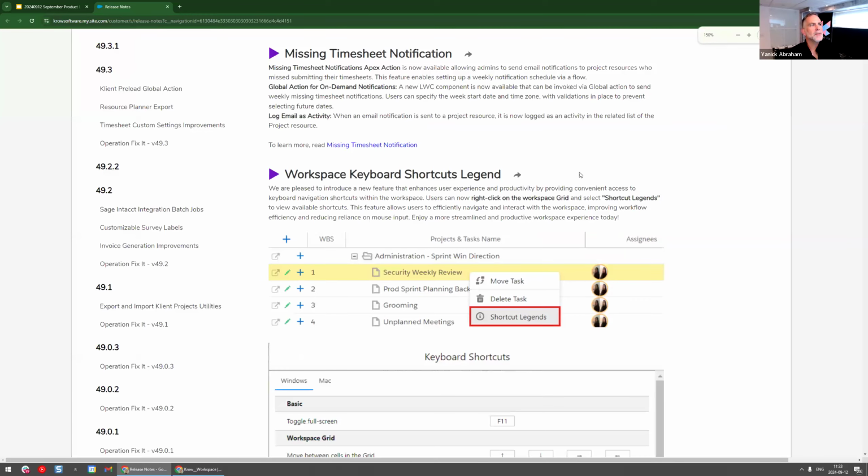Just before, that concept of missing timesheet notification is to make sure that your people are doing their timesheet on the frequency you've designed. So if you want them to submit their timesheet at the end of Friday, but that may be at midnight, on Saturday morning, you send that notification to make sure that they will fill it up.